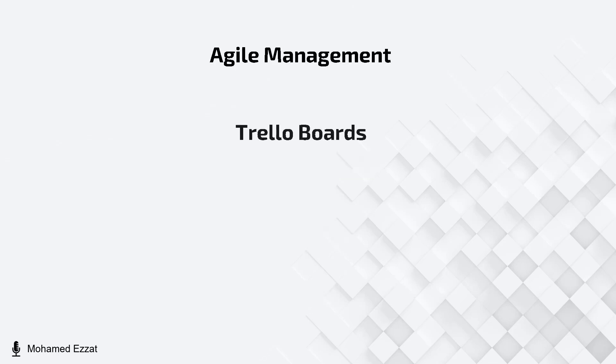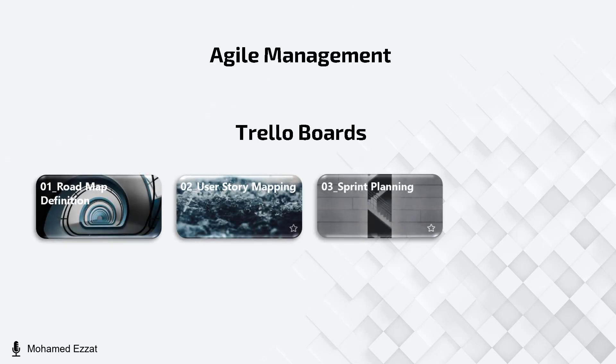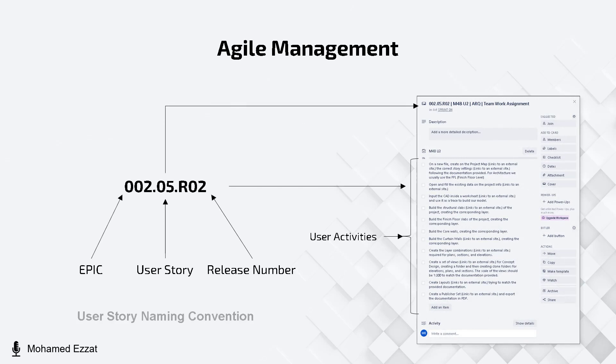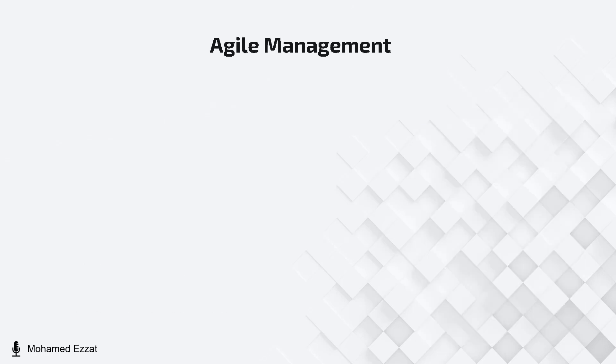Trello board was used to apply the agile approach, creating several boards defining the project roadmap, user story mapping, sprint planning, and the active sprint. Each user story had its own naming convention to easily be tracked across the different boards. The first three digits represented the epic number, the second two digits represented the user story number, and the last three digits represented the release number. The following images show our Trello boards created throughout the project.